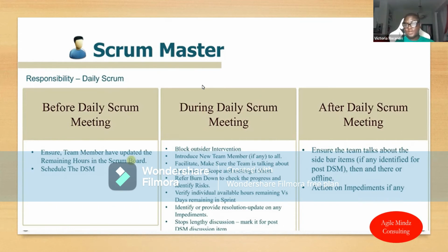Also, looking at your sprint health, right? They're there to help guide the team in successfully delivering in increments. So, going through some of those agile metrics, right? Of course, looking at your emails, your columns or your Jira board or your active sprints to see, are there any blockers that have showed up? Are there any flagged items, right? Are there any risks that have come up? That way you can use that information to facilitate your daily stand-up effectively.